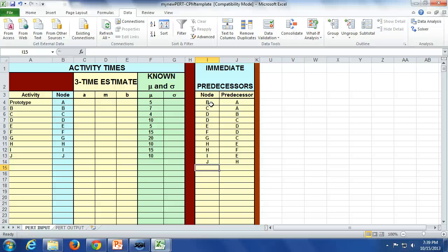Now, believe it or not, we're going to do this with Solver. Well, we're not going to do it. Solver's already set up to do this. What it does is two passes, just like we did it forward and backwards. The first time, it minimizes the completion time by adhering to the constraints. B has to wait on A. C has to wait on A. Those are constraints, and it minimizes the overall completion time. The decision variables it's deciding behind the scenes are the early start and early finish time. The second time through, it's going to figure out the late start, late finish.